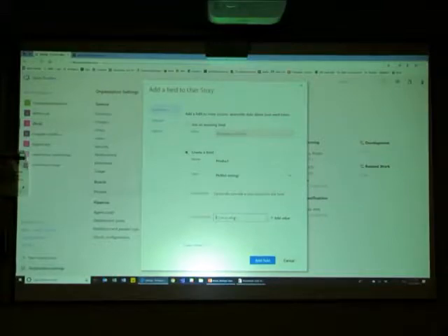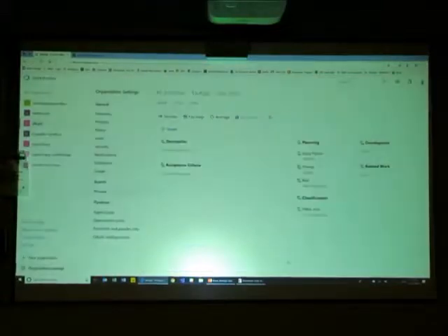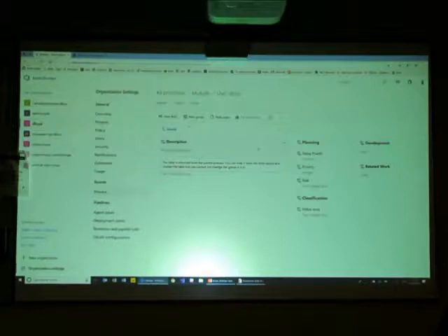Yeah. If I want to use waterfall, I pick CMMI? No, don't use that as a blanket rule. Look into all of them. Waterfall is still used by organizations requiring certification or regulation with the government, or if you have a big project with hardware and software, you still use waterfall, or a kind of hybrid between waterfall and agile.